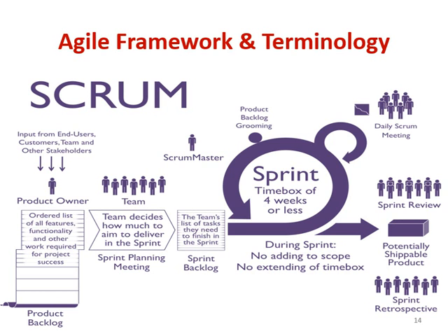So the manager doesn't have the right to direct the team that they have to deliver this number of requirements in a particular sprint or iteration. It is all self-driven and managed by the team itself. So the sprint planning meeting is done by the team. Definitely the product owner and Scrum Master are also part of the sprint planning meeting, but it is primarily focused on the team. Next, what is the output of the sprint planning meeting? That is the sprint backlog. So the product backlog is shrunk to a sprint backlog.